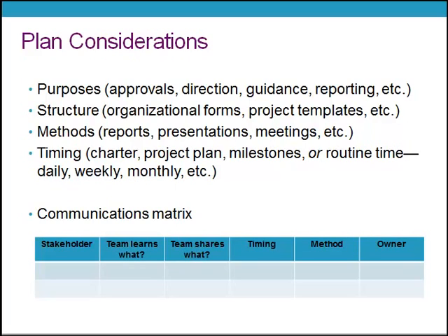It also includes timing and method, as described earlier. Other key elements involve an owner to ensure that the communication actually takes place, and it asks whether the team is to share information with the stakeholder, such as a change order request, or if the stakeholder is going to deliver information to the team, such as, say, material order status with the purchasing department.